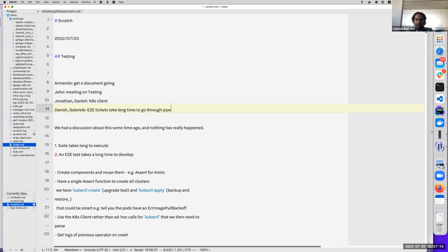There's a motto in Kanban that says stop starting, start finishing. When that happens, instead of producing more tickets that eventually will become obsolete, because maybe the review process will rewrite some of the tickets and then you'll need to rebase, the best approach is to stop adding stuff and concentrate, ask for peer reviews and ask for the review to happen.